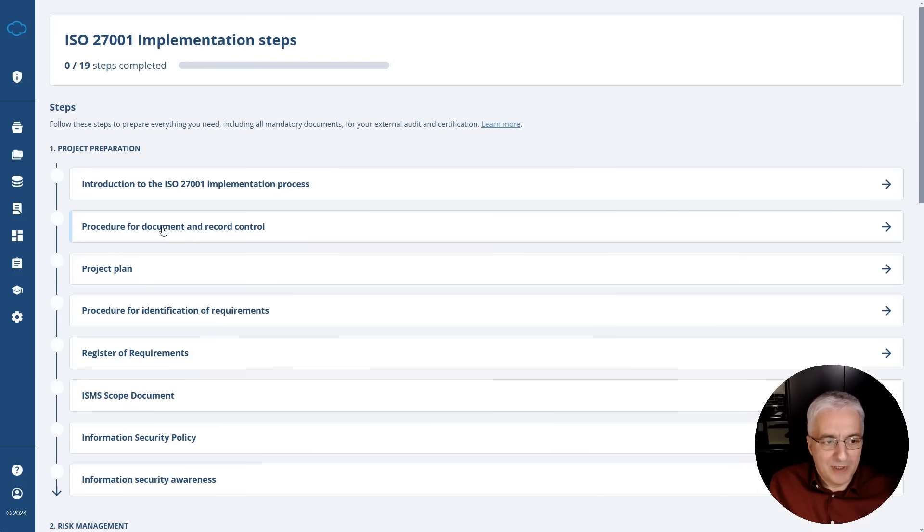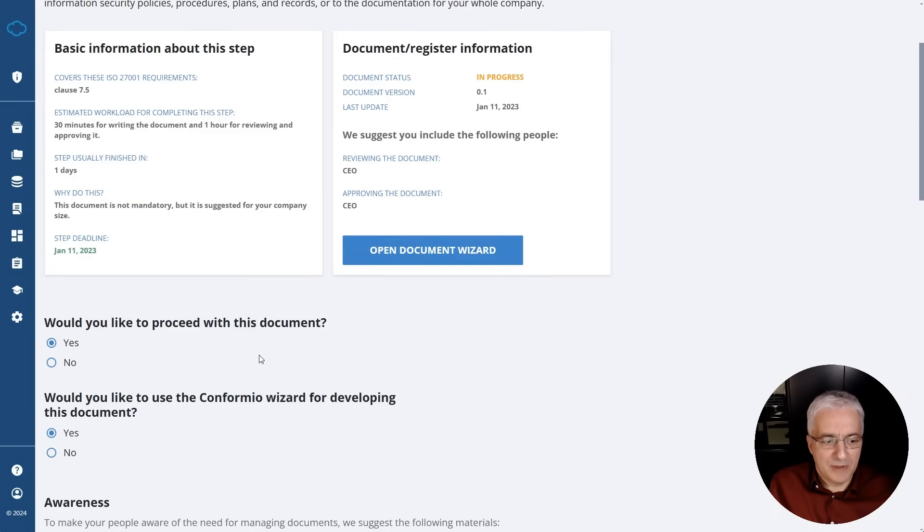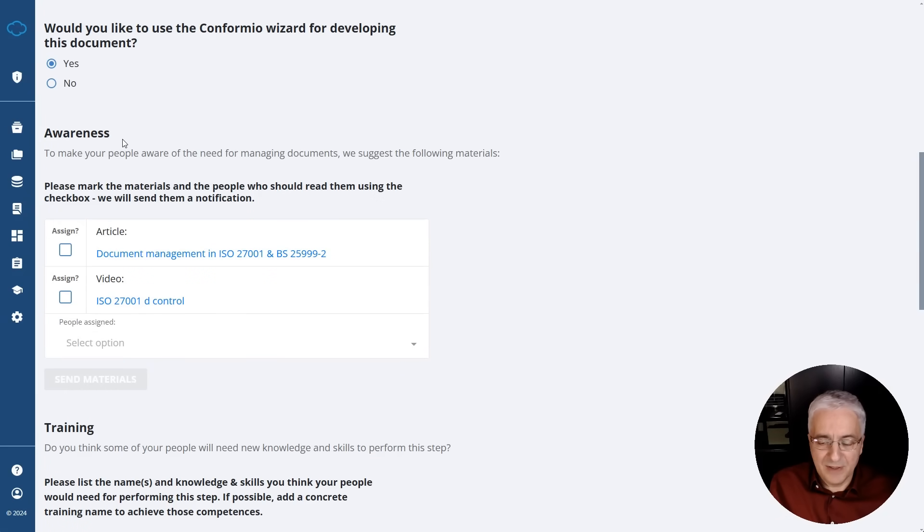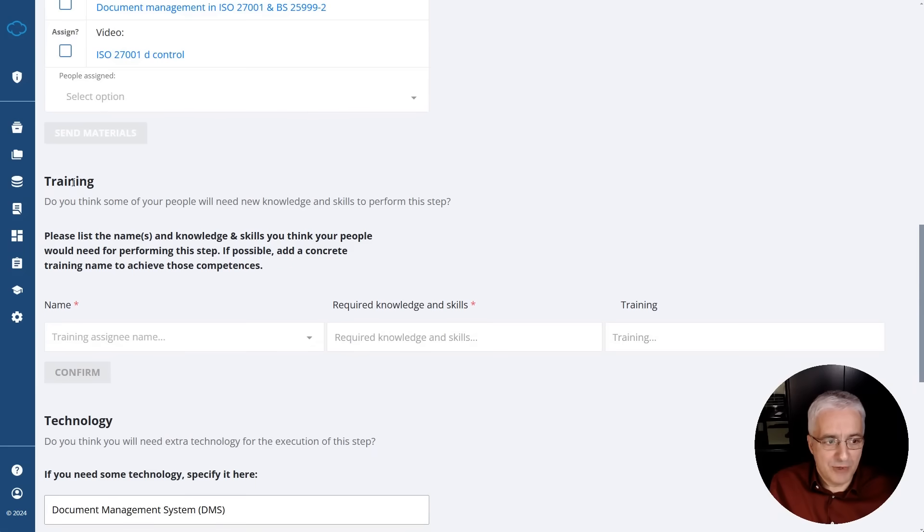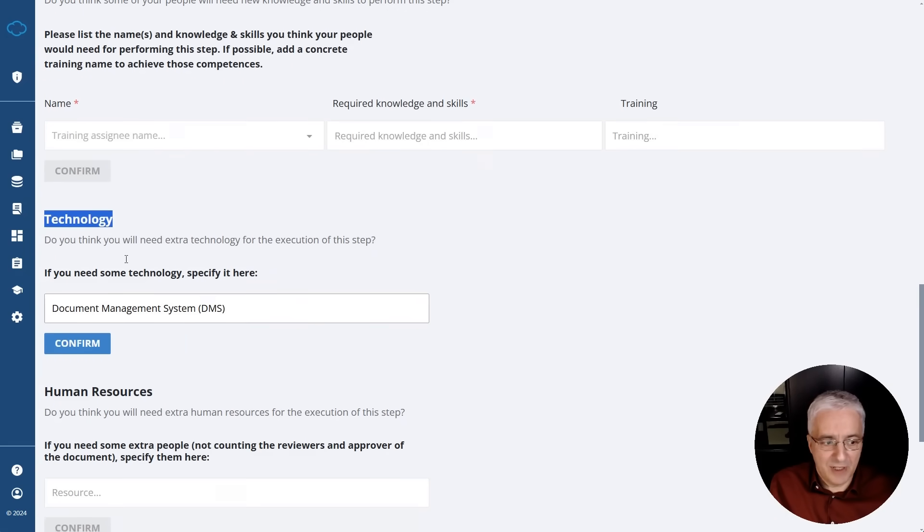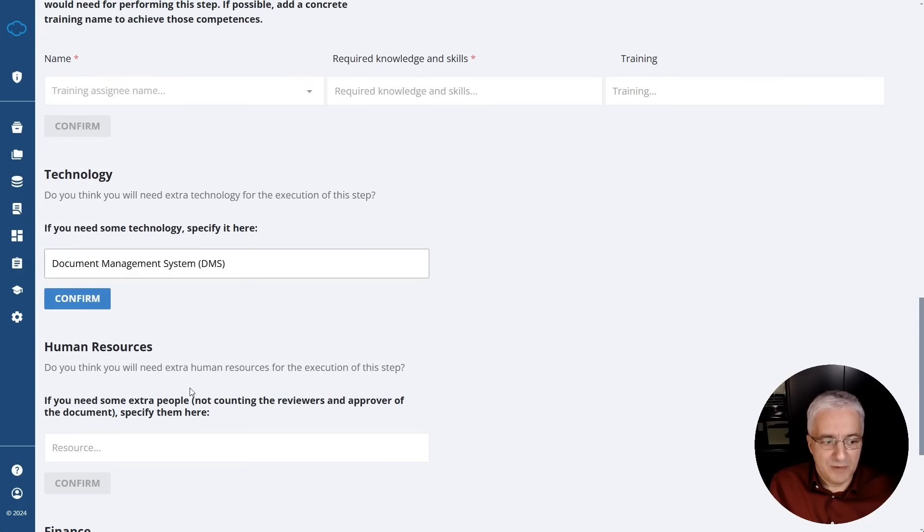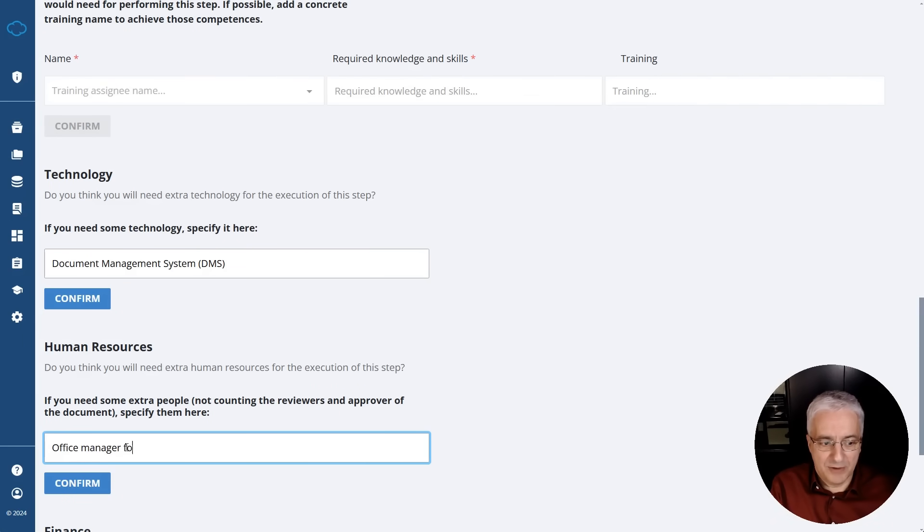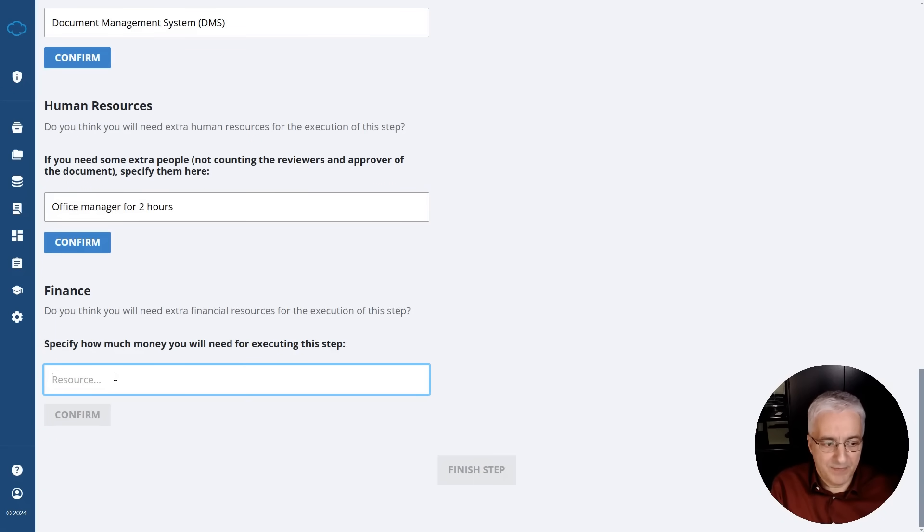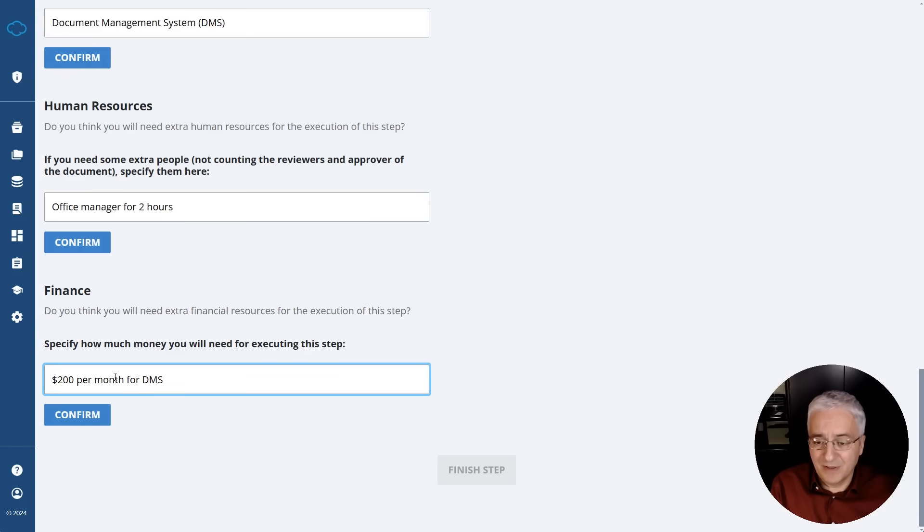And you can see this once you open a particular step, so procedure for document record control, when I click it, you see these general details about this step. But when you scroll down, you actually see what kind of awareness you can raise for this particular step, what kind of training you can organize for your employees, and then what kind of resources, in terms of technology, human resources, and finance you need. So for example, for technology, you could have a document management system. For human resources, you might have, let's say, office manager for, let's say, two hours to write these documents. And for finance, you might have, let's say, $200 per month for DMS, for document management system. So this is in general how you fill this out. What's good is that then Conformio summarizes this information and then lists all of these things in one place, for example, for all the resources that are needed or for all the trainings that are needed.